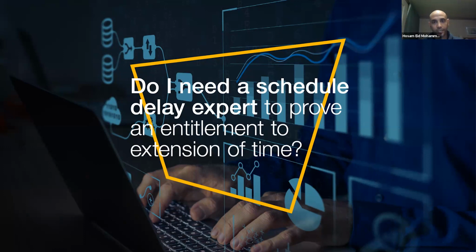Yes, it is a no at the beginning. The delay expert's role actually commences after clearing the entitlement. Maybe if there is a dispute on the entitlement and it goes to a form of dispute resolution up to arbitration, the delay expert may do some what-if scenarios, just slicing and dicing between the events in order to say, okay, if this is entitled, then this will give us this much time, so many scenarios for the sake of dispute resolution.